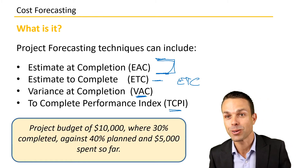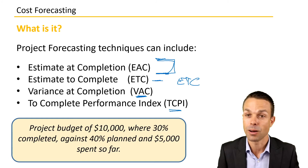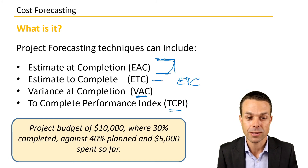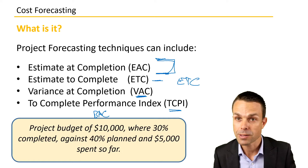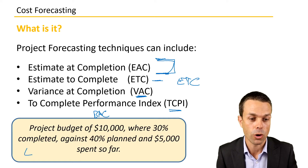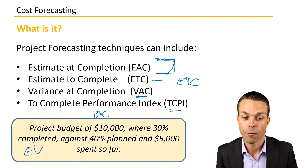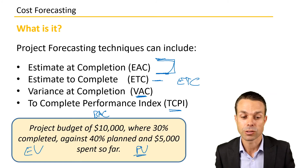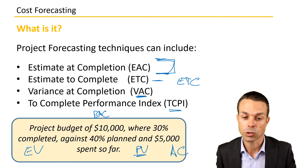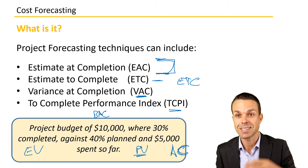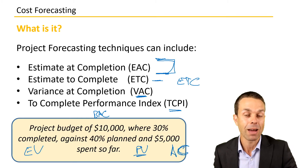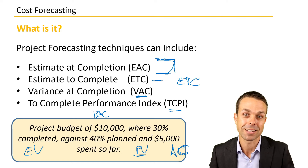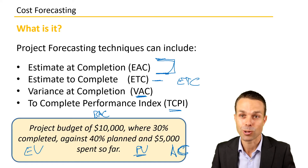The scenario we're going to go through for all of these is a project budget — budget at completion — of $10,000, where 30% is completed, which is our earned value, against 40% planned, which is our planned value, and $5,000 spent so far as our actual cost. We'll use these figures in the calculations for this particular project scenario.